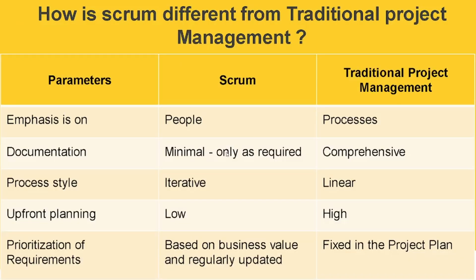How is Scrum different from traditional project management? Traditional project management emphasizes conducting detailed upfront planning for the project, with higher priority on fixing the scope, cost, and schedule and managing those parameters. Whereas Scrum encourages data-based iterative decision making in which the primary focus is on delivering products rather than satisfying customer requirements. To deliver the greatest amount of value in the shortest amount of time, Scrum promotes prioritization and time boxing over fixing the scope, cost, and schedule of a project. An important feature of Scrum is self-organization, which allows the individuals who are actually doing the work to estimate and take ownership of tasks.